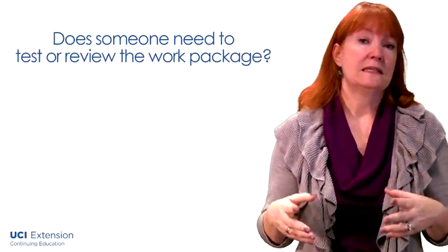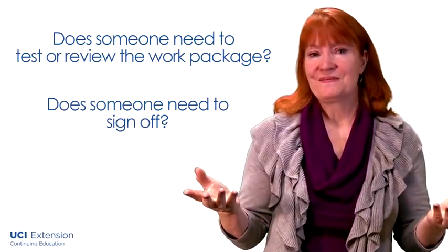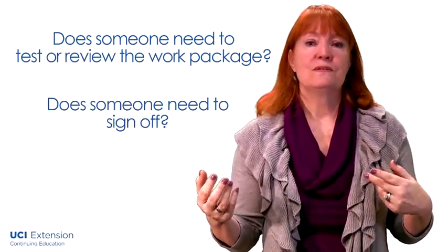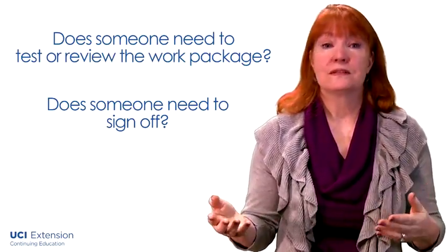As you create your work breakdown structure, you want to work with your team to define acceptance criteria for each work package. Does someone need to test or review the work package? Does someone need to sign off? These reviews and sign-offs are important parts of the project and should be planned and scheduled and budgeted. Plan for quality control before you need it. Understand what tools and processes are available to you and engage your quality management team from the start of your project. You will be glad that you did.